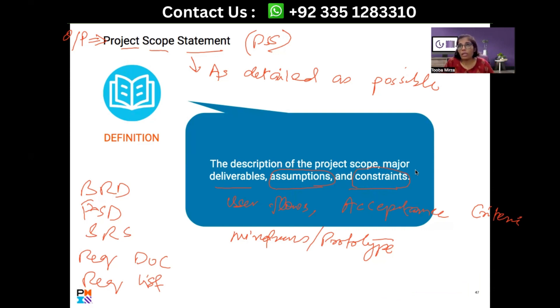And they are going to bear the cost, not us, because we have written that down in the document. If they've never read that, this is on them. So this is how assumption saves you. Calling that out in the document saves. And if you have the approval on those assumptions, then this is the safest. No planning is ideal. Plannings are always on the ground of assumptions and constraints.